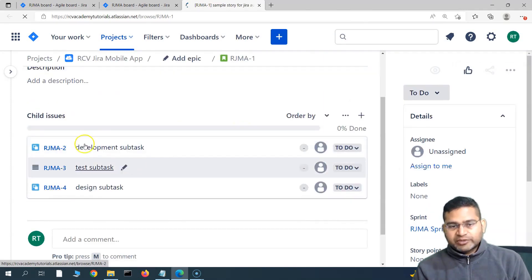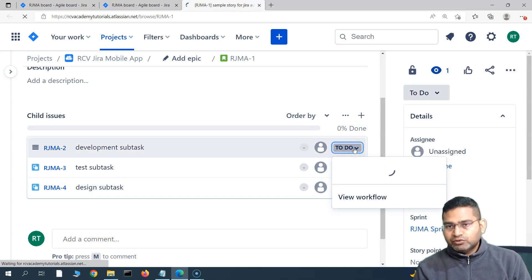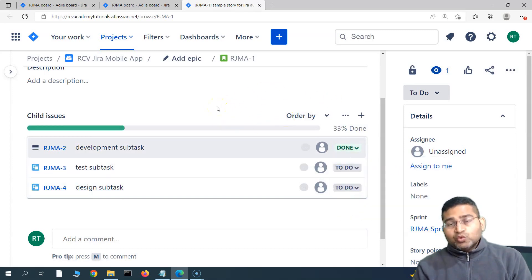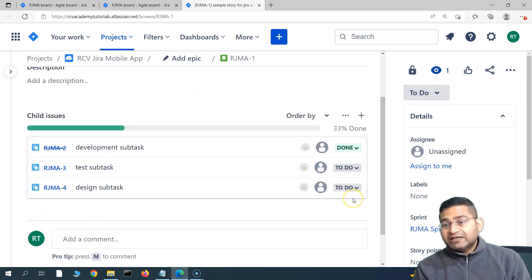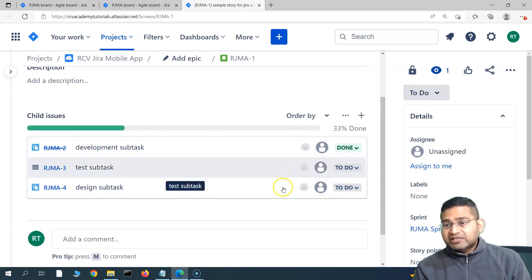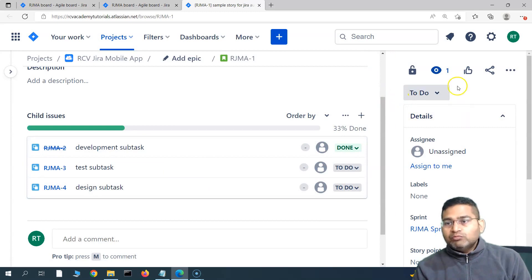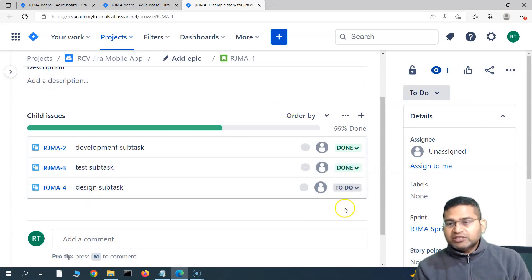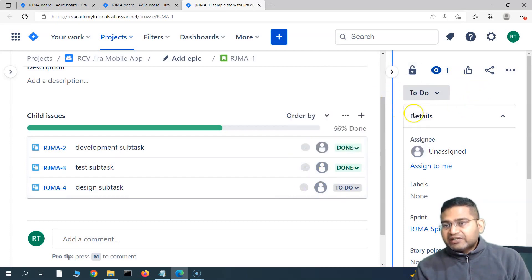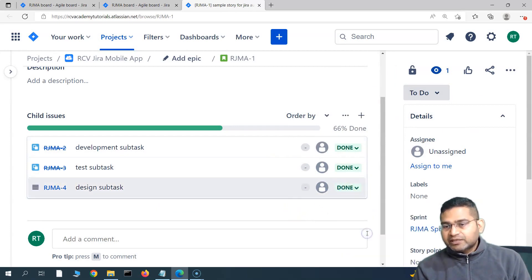Let me open the story in a new window and try to close the tasks one by one to see the rule working as expected. There are three subtasks. If I close the first one by transitioning it to Done, the rule triggers, checks the parent — parent is not done, so the first condition passes — but two subtasks are still open, so the second condition fails and the parent does not move to Done. Closing the second subtask, there is still one design subtask open, so the rule again fails on the second condition and the parent story remains open.